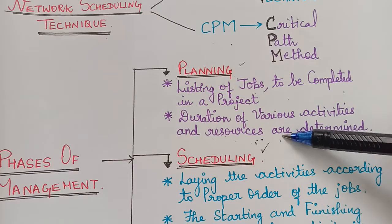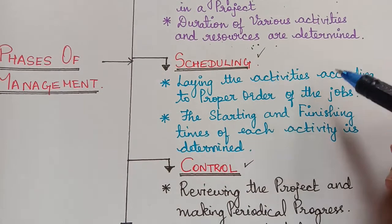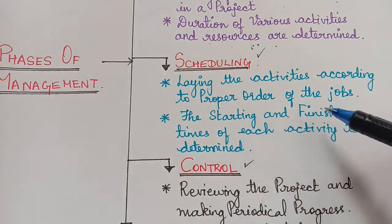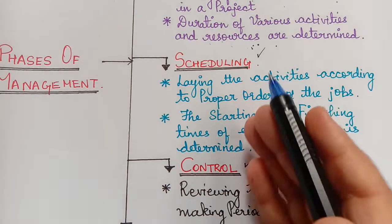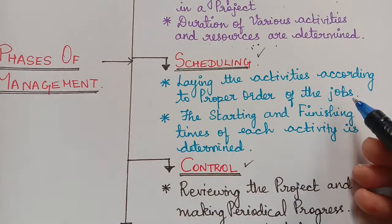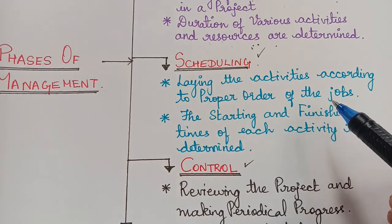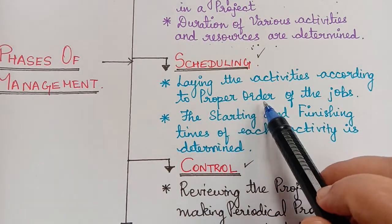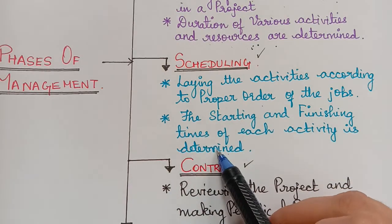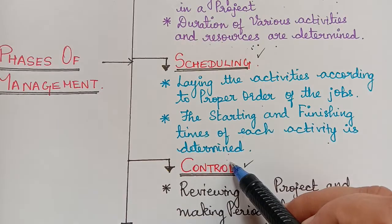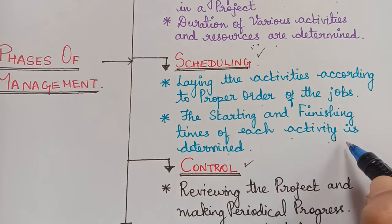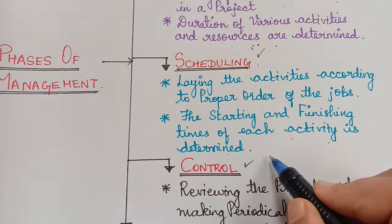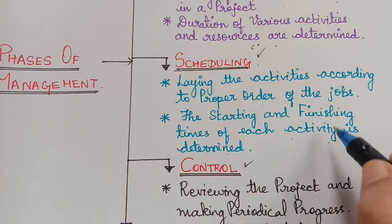The second phase is Scheduling, which involves laying out the activities in proper order — that is, in a logical sequence — determining after which job the next has to be carried out. For example, in the construction of a building, first we have to lay the basement, then proceed with other activities. Also, the starting and finishing times of each activity are determined under Scheduling.